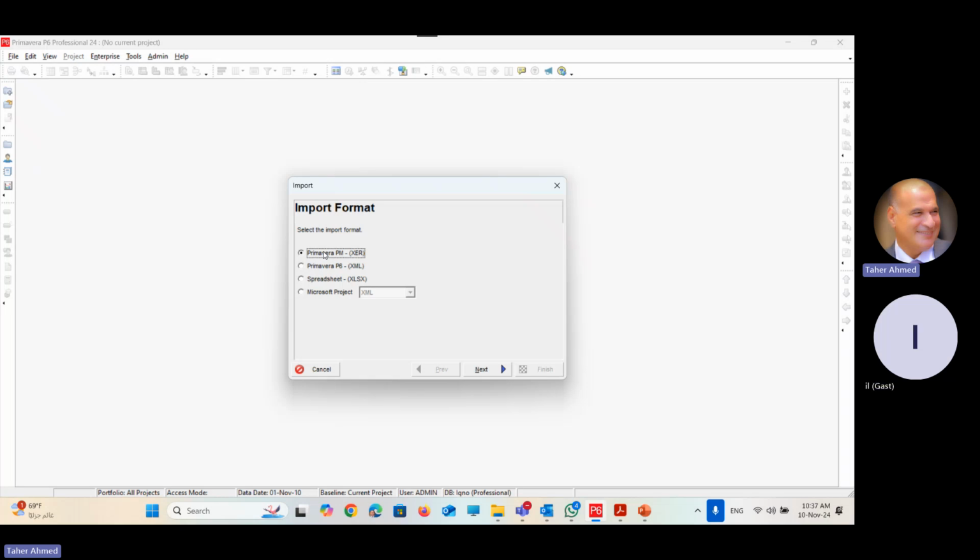I believe you know the lag, the time we put between the relationship. The calendar of the lag in Primavera is 8 hours per day, based on the predecessor activity calendar. The lag definition in Microsoft Project is 24 hours per day. So if you import Microsoft Project to Primavera and some activities have lag, Primavera will multiply the lag by 3. Why by 3?